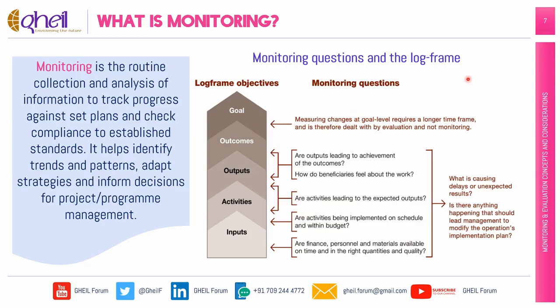This diagram summarizes key monitoring questions as they relate to the log frame's objectives. Note that they focus more on the lower level objectives: inputs, activities and, to a certain extent, outcomes. This is because the outcomes and goal are usually more challenging changes, typically in knowledge, attitudes, and practice behaviors, to measure, and require a longer time frame and a more focused assessment provided by evaluations.